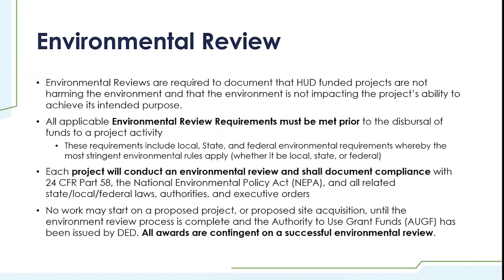The environmental review must be complete prior to the release of CDBG funds. No project work can start prior to the completion of the ER. This includes acquisition and construction activities. When the ER is successfully completed, including the proper paperwork maintained in the file and the required public comment periods, the state will provide a written release of funds, at which time project activities can start.